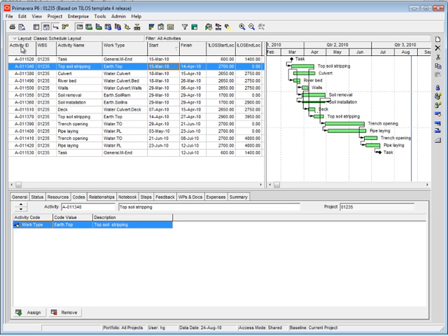The activity ID was created from the activity ID inside TILOS, but instead of using the activity ID, also a global unique ID can be used to identify and update activities inside both applications.